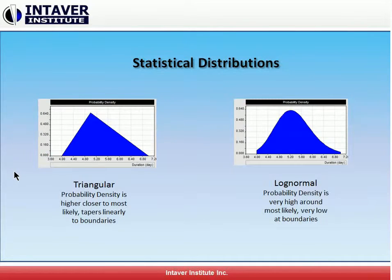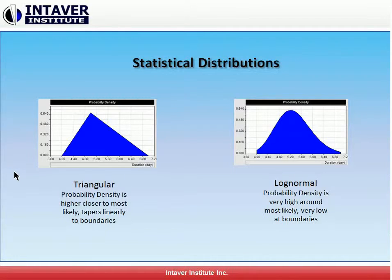Here are two common statistical distributions used when modeling duration uncertainty: Triangular and Beta. Of the two, triangular is a simpler distribution to model. All that it takes is a low, high, and most likely estimate. Some of the other distributions require other parameters and can take a lot of time to model.